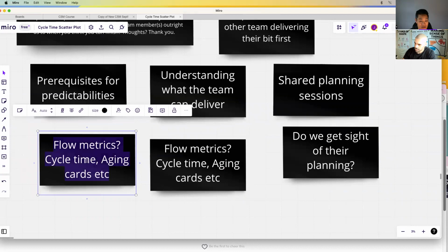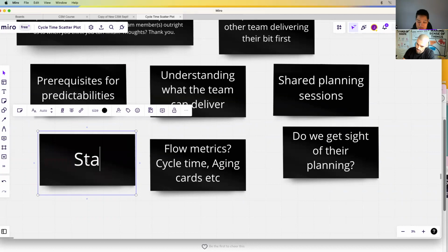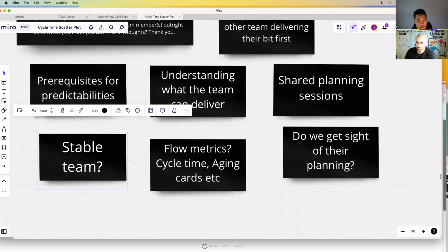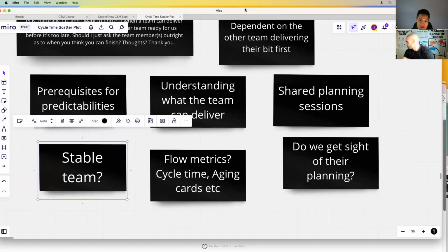And if I think that the risk is quite high because they're a team that's in chaos and they'll get lots of P1s coming through, or they're not limiting their WIP, whatever it is, then I would probably add a little bit of buffer on there and say, look, they've said they can meet the date, but let's give it another 2 weeks or 4 weeks. Let's plan for the worst case. If we think they'll be more predictable, then maybe we give them 1 week leeway instead of 4 weeks. So those are the sorts of things I'd be thinking about.